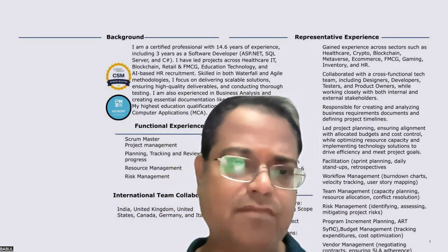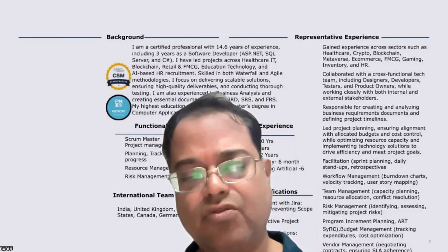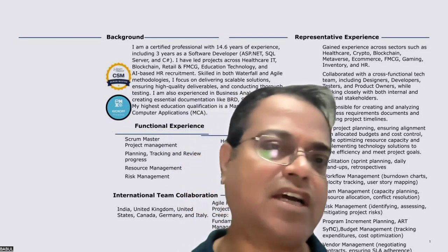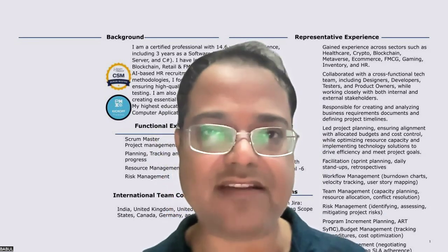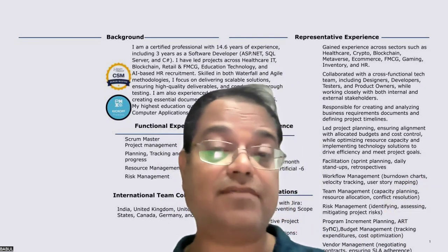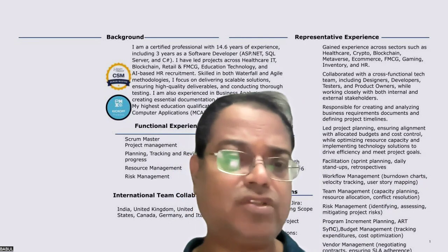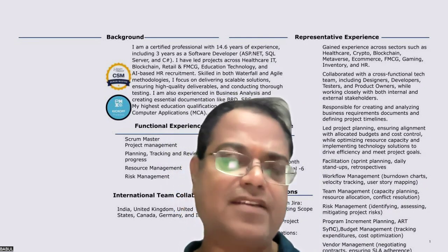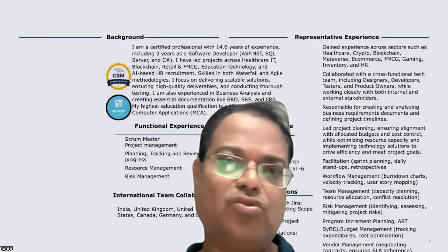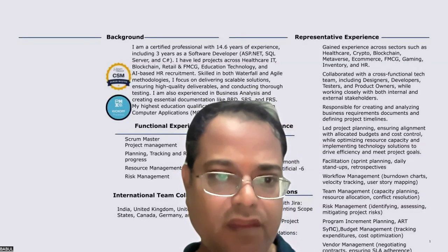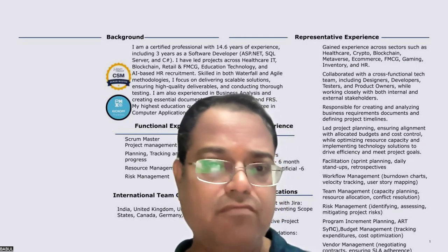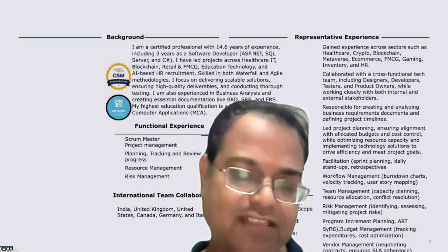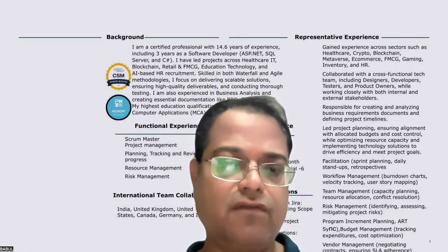If as a scrum master you feel that yes, someone really has more tasks or a more complex task, and that engineer really needs some sort of support to do quality work, then I can redistribute tasks, or minor tasks, to the junior engineers as well, to avoid the overburden of tasks. So that is the approach a scrum master should take: visualize with the help of the sprint workload visualization.